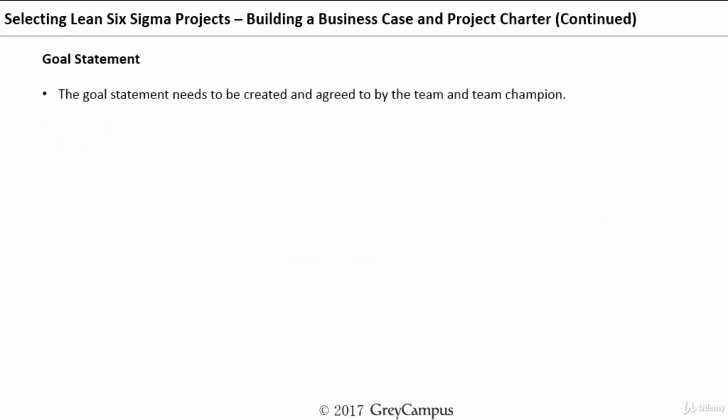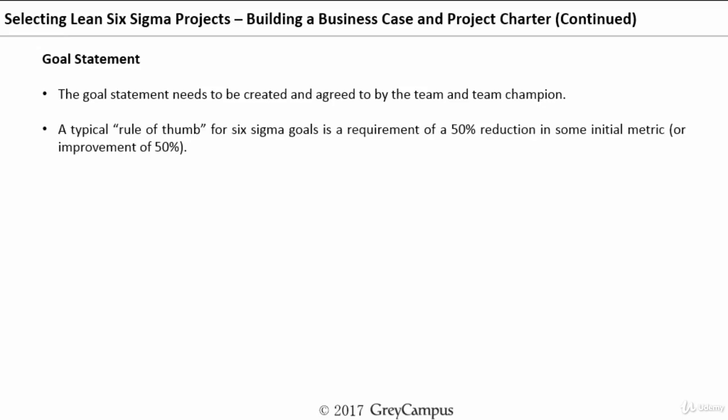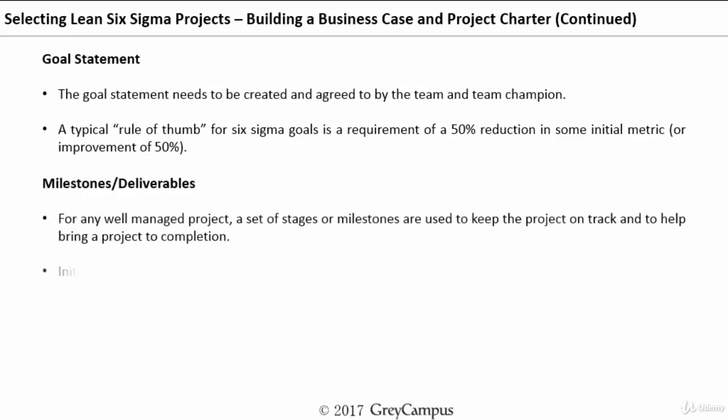The goal statement is equally important as the problem statement. In the goal statement, we set the objectives of what we want to achieve and when. While the problem statement describes the issues, the goal statement clearly states we want to improve from one level to another. Using our example, the ideal goal statement would be: 'We want to reduce rejections from 12% to 8% by July 2018.' This captures the metric (rejections), the baseline (12%), the target (8%), and the deadline (July 2018) — all essential elements of a good goal statement.